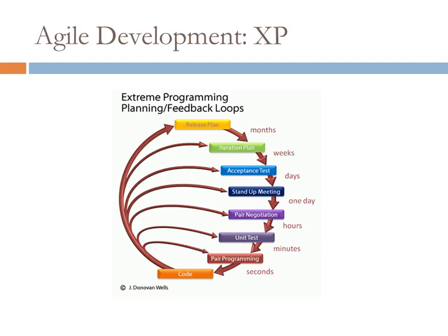And much like the rapid application development process, they focus on going through iterations of development, where you outline key releases of the software. You prioritize the specific functionalities that are needed so you can actually produce a working system as early as possible. And so there are a variety of processes associated with that.